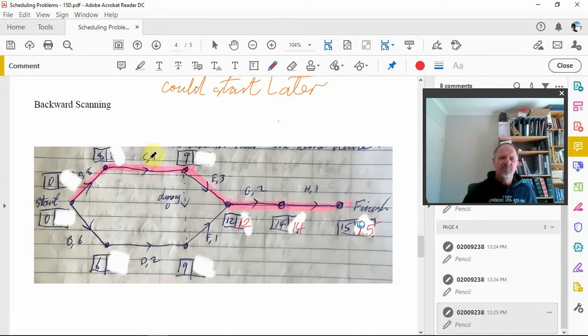All right, then let's go around this way. 12 take 3, 9. 9 take 1, 8. 8 take 8, 0. But what about if we go around the other way?